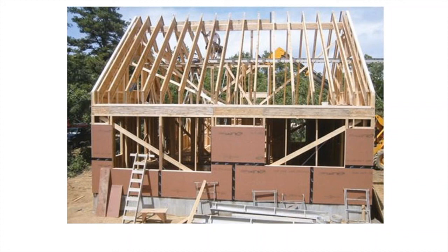By that I mean you've got to be able to evaluate where you're at, and the only way I know to evaluate it is with having these guys do your air testing. And you need to be at a point where you can make reparations to things that aren't working out so well. So if you're doing this exterior insulation and you're air testing and you're finding that you're not getting the result you should, you need to go around and check for where it's breached. And if the thing is complete or if the drywall's on, it's too late. So you've got to do those intermediate air tests. I think that's about it.